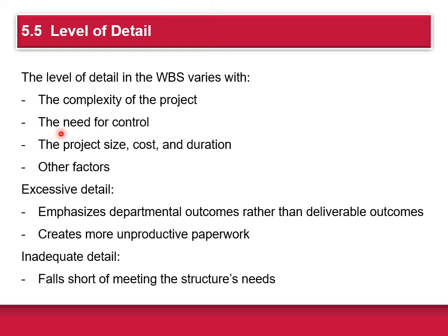So the level of detail in the WBS is different for different levels of management. At any level, the detail should be no more than necessary and sufficient. Top management interests usually center on the total project and major milestones, events that mark the major accomplishments. Middle management might center on one segment of the project or one milestone.